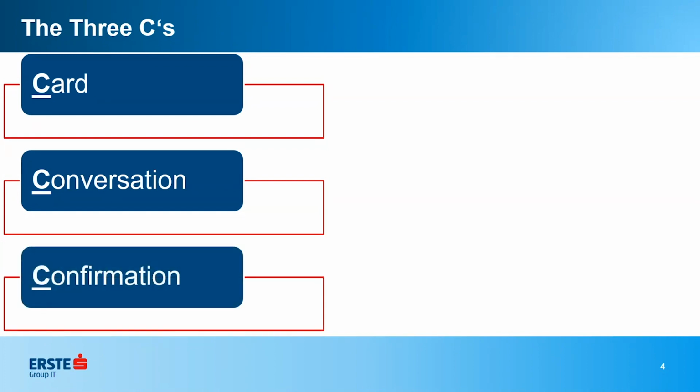And then you have the confirmation, which is usually the final nail in the coffin. Once you've had a refinement, the team has come up with good acceptance criteria, and the story is written well, finally you can do an estimate. If the whole team is able to come to an agreement on an estimate, then you have a pretty good idea that the entire team understands exactly what's required for the story to be done. However that confirmation happens, for most teams, it would be the estimate.